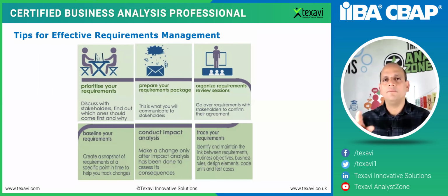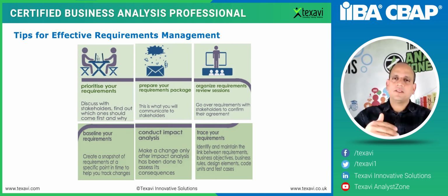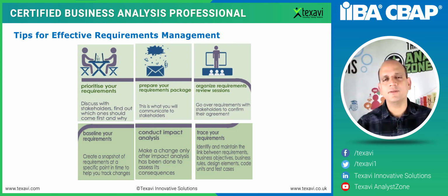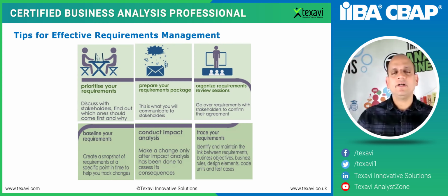Again, prioritize the requirements in the backlog, then create the next sprint, that is the second baseline. So you kind of take subsequent snapshots of the backlog, and each of them is going to be incrementally adding value to your product as you go, as you complete that sprint. So let's say by the end of the first sprint, you don't have anything, you don't have a wireframe as well, but by the end of, let's say, 20th or 30th sprint, you've got pretty much, let's say, about 15-20 features to 100 or 1,000 features, depending on the size of the product and the type of the product,